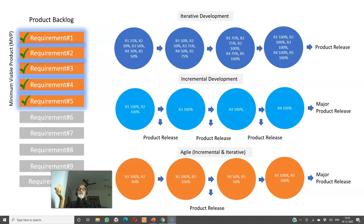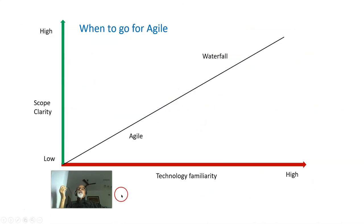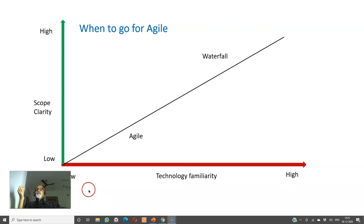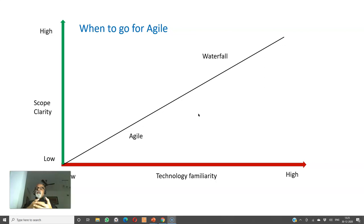So we discussed waterfall, iterative development, incremental, and agile. Now, when to go for agile and when to go for waterfall: if the technology familiarity is very high and the scope clarity is also very high, then it is better to go with waterfall. If the scope clarity is very low and the technology familiarity is also very low, then it is better to go with agile project management. And sometimes even within waterfall, we try to implement some agile best practices and processes, and then it becomes a hybrid kind of model.